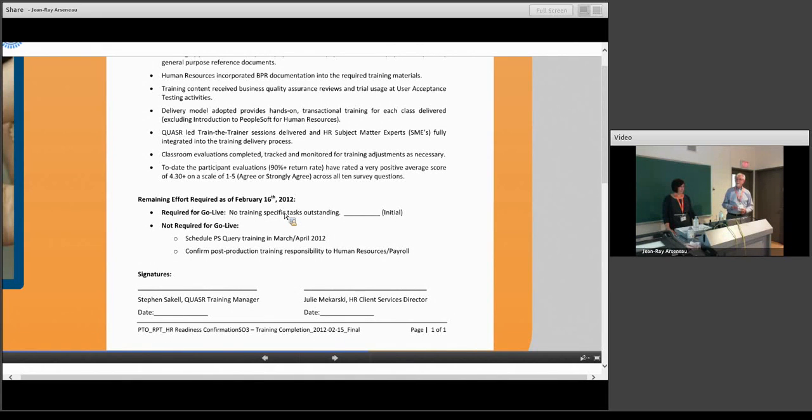The interesting part about the sign-off process is we went live, as Debbie indicated, in February. And we had the vast majority of the sign-off documents signed off in, I believe, the 1st or 2nd week in January. This is just an indication of the environment that we had at the time. Our governance and executives, within a week and a half of go live, required a re-sign-off on every single document. There was enough concern that we needed to go back out and have all of the individuals that had signed them 3 weeks earlier re-sign those. I only convey that because it was the environment we were living in at the time.